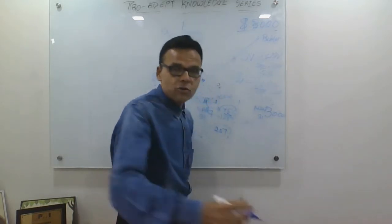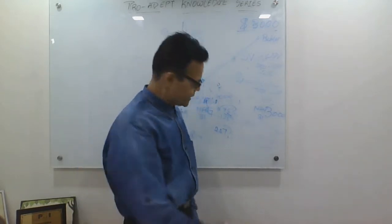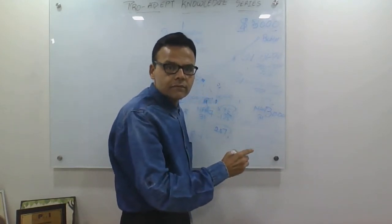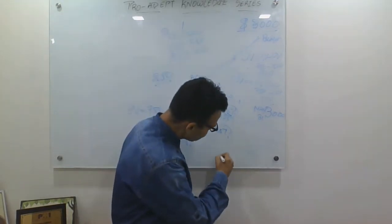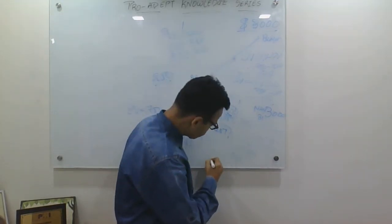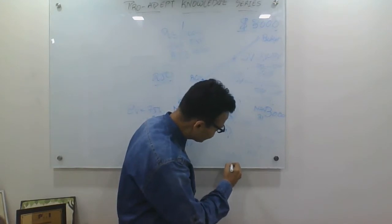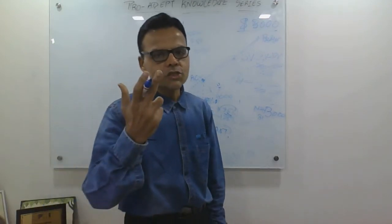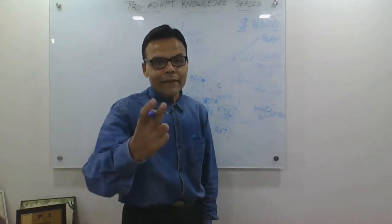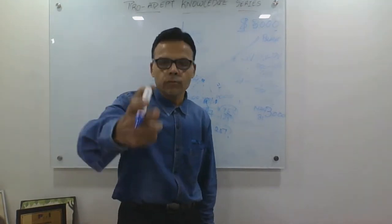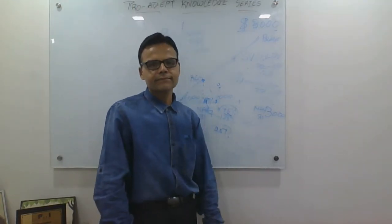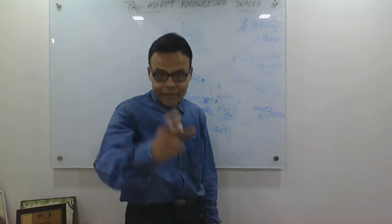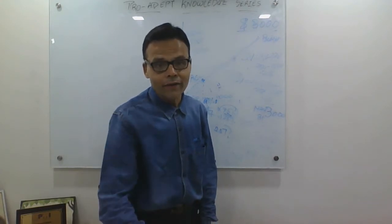Do you understand? And the biggest interesting thing I'm going to show you here is when you multiply these two numbers - your schedule performance index and cost performance index both - what do you get? You get a square of 0.75, which is 0.5625. Do you realize this? In practical world, when you have multiplied these two lagging figures, the multiplication just brought you to half. Think through this integrated performance.